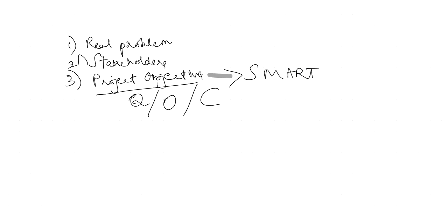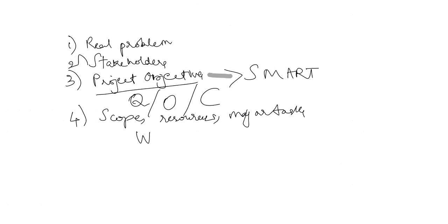once you get to it, you will get to the stage of determining scope: determining your scope, your resources, and major tasks. Here you can leverage something called a work breakdown structure. To create this WBS, you should ask what will have to be done in order to accomplish a task or the goal X.